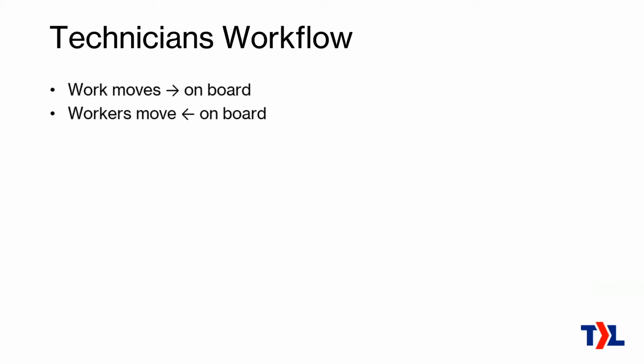The reason they do that is because the stuff towards the right side of the board is closest to being complete. And when they work on that stuff first, then you are delivering, and this is really key, you're delivering the value to the customer. The customers don't care about a half-finished ticket. Maybe the technician has done half the work, but until it's totally done, the customer doesn't get any of the value. They get the value from that work all at the very end.